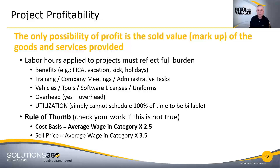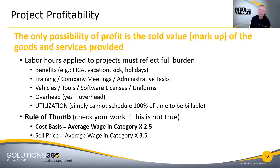At Solutions 360, we have extensive spreadsheets to help with this calculation — if you want one, tag me after this call. It's a worksheet that does a bottoms-up detailed review. Many people — even accountants — don't believe me until they do the work themselves and prove they are under-costing their project labor. Just take the average wage category, multiply by 2.5, and use that against your internal costing sheets to see how close you are to fully costing your labor.